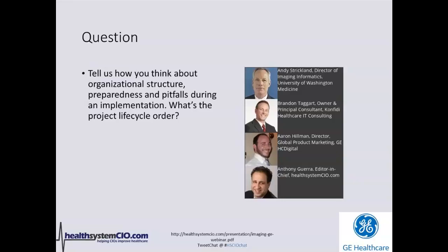But I would say really approach a project focusing on the most complicated items first, prior to making some further strategic decisions. What I mean by that is let's take, for instance, data migration. Data migration has been an Achilles heel for most organizations that take upon an enterprise imaging project. It's always underestimated how long it's going to take, and whatever timeline you're given, double it. That's most likely what it's going to be.